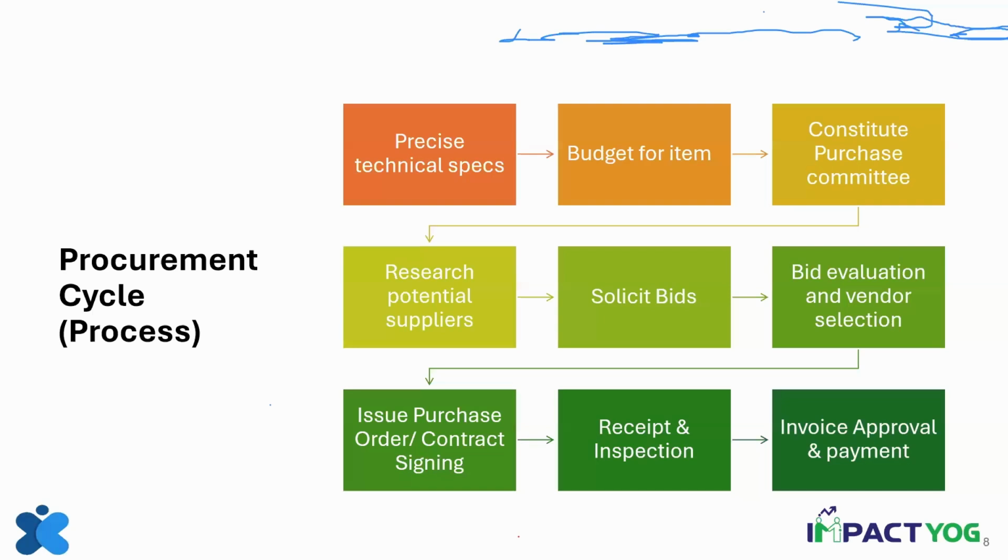There is a standard template that all will have to follow. So if packing and transportation is not included, we will just say nil. If GST is mentioned there, and the product is from a GST vendor, then we will have to pay GST to that particular vendor, the goods and services tax. So the purchase order will ensure that all people who are making purchase orders understand the terms of the purchase similarly. Contracts are used when there are specific deliverables to be made by the vendor. So normally contracts will be done for works and for services.